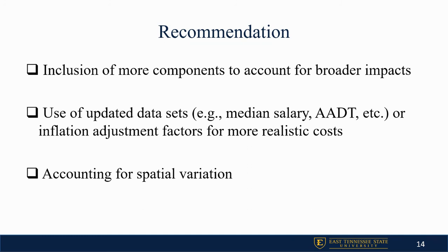They include only the value of time and the vehicle operating cost component. But the inclusion of more components will establish an accurate and standard road users cost. Road users can be rest assured that most of the inconvenience they face has been accounted for.